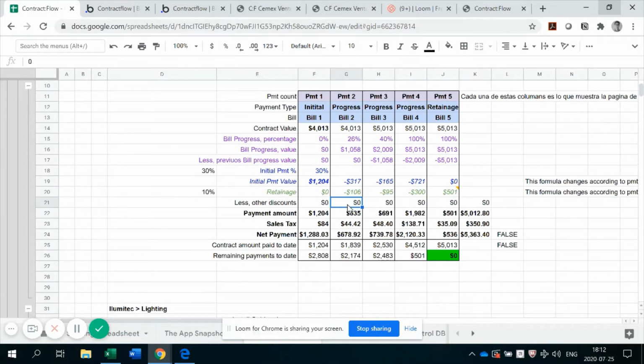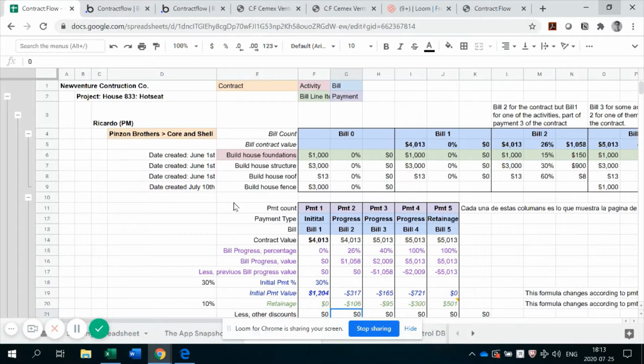Let's say you lent this subcontractor a piece of equipment that he was supposed to supply, and then for some reason you lent it to him, and then that can be discounted from the contract. This flow of information, I think it's very universal, and I validated it not only through my work, mostly in Panama, but also some work in the US.